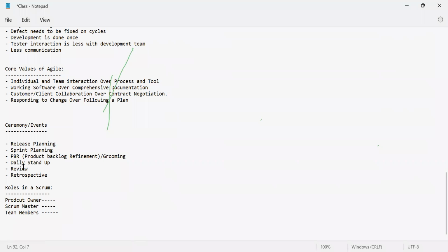Yes, of course we can develop it. Will we be able to deploy to production without a platform? No, right? So for definition of ready we will say that, in order to develop this status module, settings should already be ready.